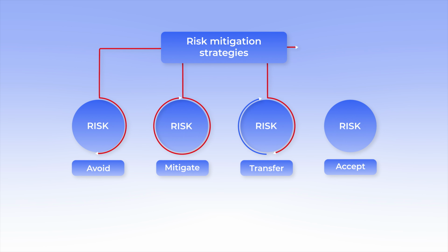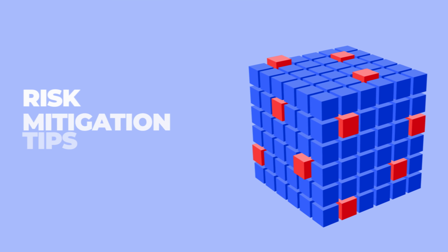Accept. This technique is used when the impact of a risk is assessed to be at a level that the project can withstand. The expected benefits usually outweigh the potential losses. This approach works well for known risks that may have arisen in similar projects.